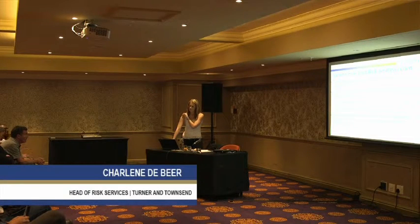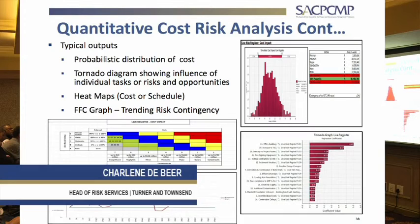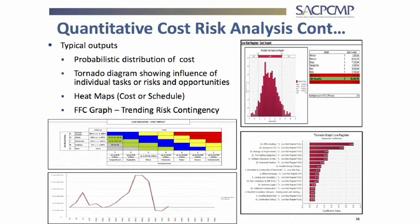We use probability of cost analysis or schedule overrun, and we have two separate risk registers we can do. These are the outputs we get from a quantitative Monte Carlo simulation. We get a probabilistic distribution of cost, giving us P50, and you can ask it to give you P10, 50, and 80%. You can choose any probability range you wish.